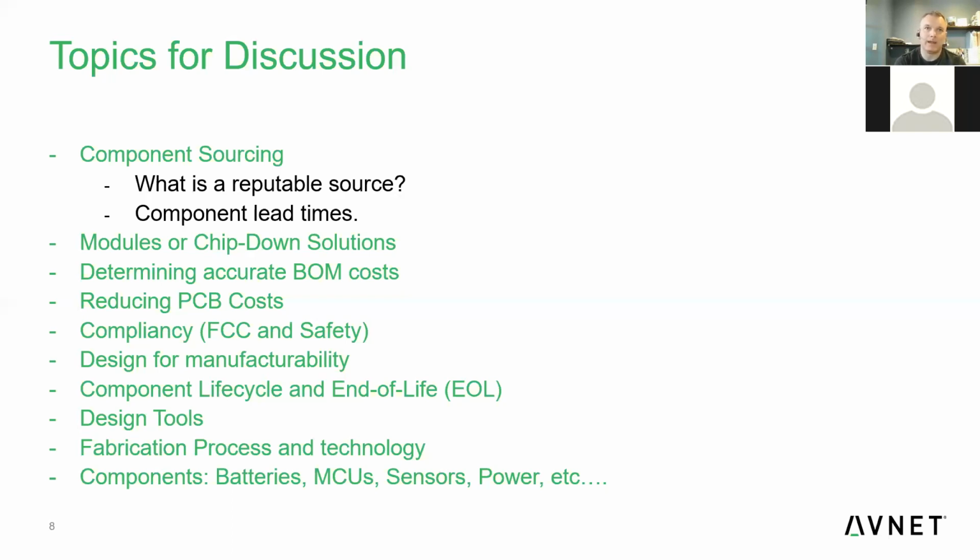They're not 100%, but it will make some guesses based on the demand for the product, and it will also flag products if they are not recommended for new designs. That is typically the stage they go into first, which is usually about 6 to 9 months from end of life. So a lot of those things get flagged in our system, and hopefully we can pick them up. But like I say, it's not 100%. It's just one of those things that you have to consider as you move through a hardware-based product.